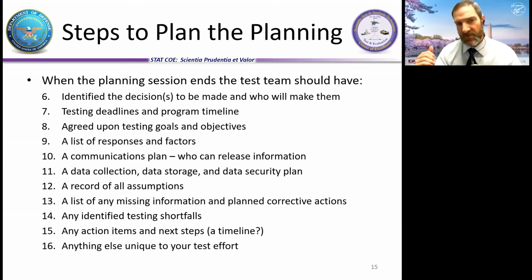A record of assumptions. This is another one because, coming in and looking at test plans already created, oftentimes our teams looked at it and said, well, why did that test team decide to do this or choose these factors or not vary this factor? And I'm sure there's always a good reason for it. But what was that reason? What were those assumptions, and are they still valid? So record it, right? And I'm sure whatever assumptions you come up with, I guarantee some will be wrong, right? But record what you were thinking at that time, and as assumptions change, you can change the plan.